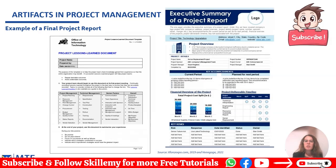A significant portion of the final project report is dedicated to evaluating the project performance. This can include comparing the project outcomes with the original objectives and key performance indicators, the KPIs. Were the goals met? Did the project stay within the planned budget and within the planned schedule? We have to answer this question on the final report. This report should also discuss any challenges or issues that arose during the project and how they were resolved. This section is particularly valuable for identifying the lessons learned that can inform future projects.